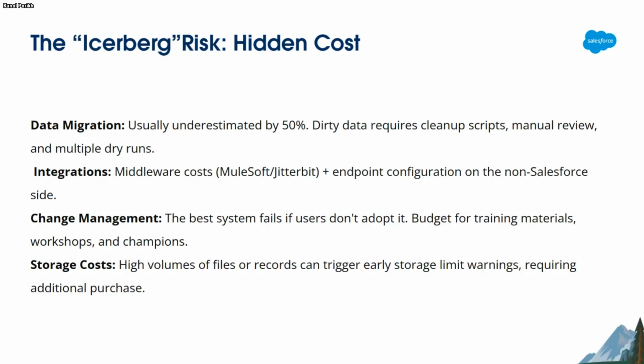And if you have a stringent, defined process of change management, it gets easier to justify to prospects and clients when it comes to asking for additional money or additional charges, because otherwise, without a stringent process, it becomes very difficult to justify changes, and customers don't accept it, and it leads to conflict and so on and so forth.